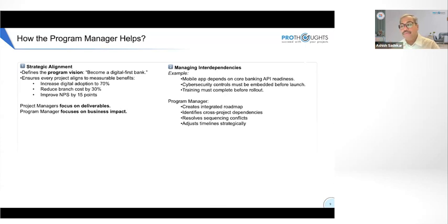Even in agile programs, if we are doing SAFe, with something like a program increment, we do a planning flow event where we spend two days understanding the dependencies if it's a quarterly release. It's a very important aspect of doing an agile program or any agile project, because you need to resolve the dependencies.